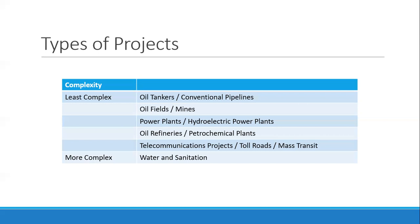That's the case for power plants, oil fields and mines, and conventional gas pipelines — you only build as much as the offtaker requires, which makes project finance easier. Versus water and sanitation, which depends on how much people consume, which you cannot predict. You can forecast it, but it won't be 100% accurate, which makes cash flows more volatile and project finance more difficult.